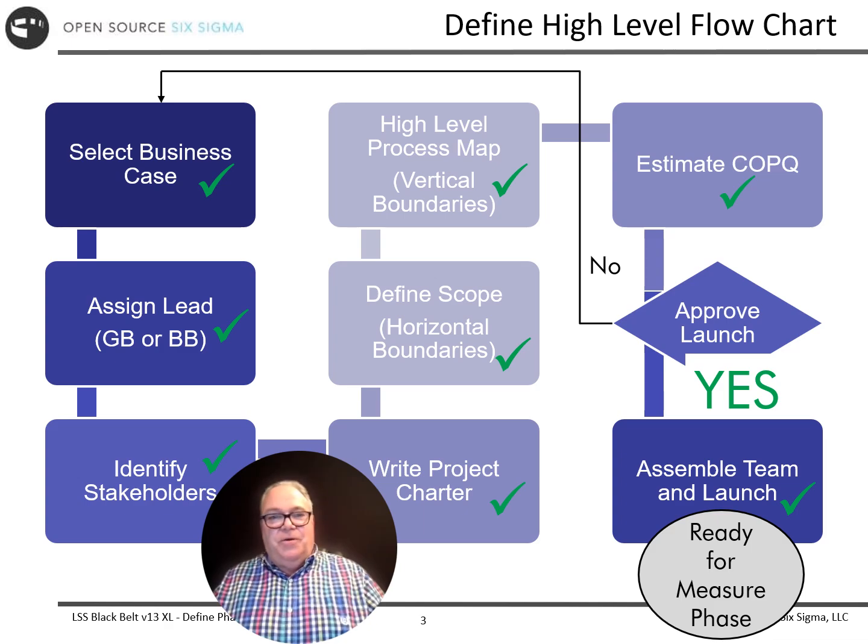We talked about chartering and all the elements of a good charter: your team, a timeline, the objective statement, restating the business case as the problem statement.